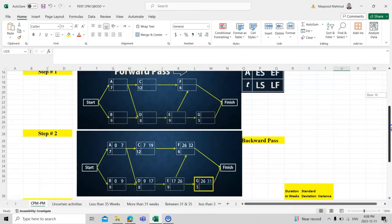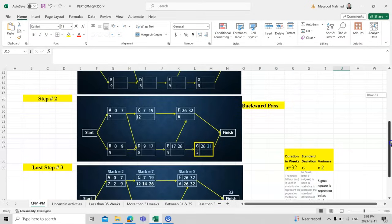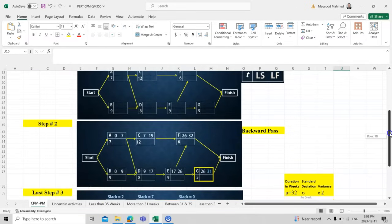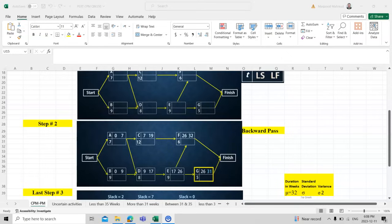Step one is complete. Now in step two we perform the forward pass. For Task A: ES = 0, EF = 0 + 7 = 7. For Task C: ES = 7, EF = 7 + 12 = 19. For Task B: ES = 0, EF = 0 + 9 = 9. For Task D: ES = 9, EF = 9 + 8 = 17. For Task E: ES = 17, EF = 17 + 9 = 26.